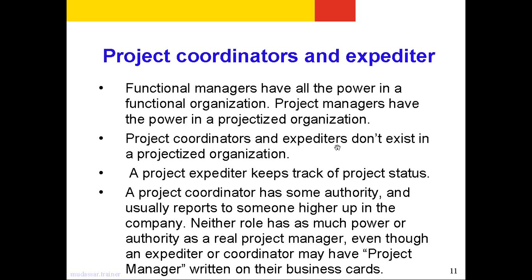The project coordinators and expeditors don't exist in the projectized organization. Very important thing. A project expeditor keeps track of the project status, whereas a project coordinator has some authority and usually reports to someone higher up in the company. Neither role has as much power or authority as a real project manager, even though an expeditor or coordinator may have the project manager written on their business cards.